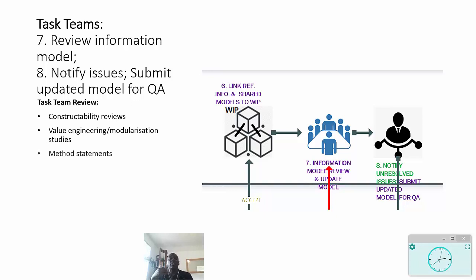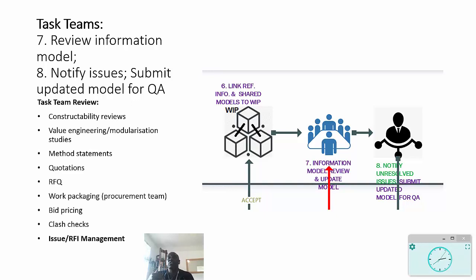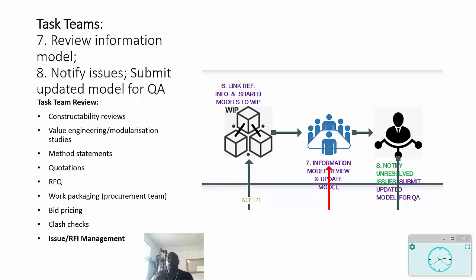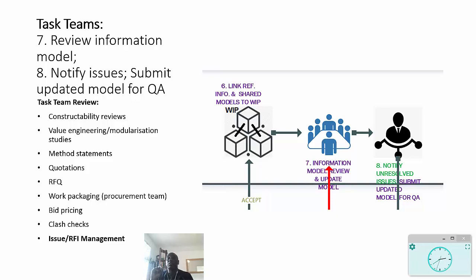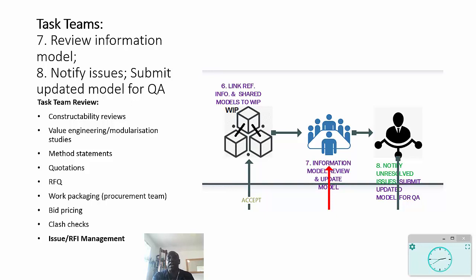As we move on, the other thing to notice is the importance of reviewing the information model. Some of the things that might be part of those reviews are specified in the bullet list there, so it could be for constructability, you might be doing some value engineering, or you might be doing a modularization study. The important thing is using this data, which includes the model, in order to produce or to derive this information, rather than producing these as separate items which have no connection to the model data. The other important aspect is clash checks which need to be conducted, and also issue and RFI management, so that you can then identify which are the major issues that need to be addressed, and those can be escalated to the project level and addressed by the lead appointed party.